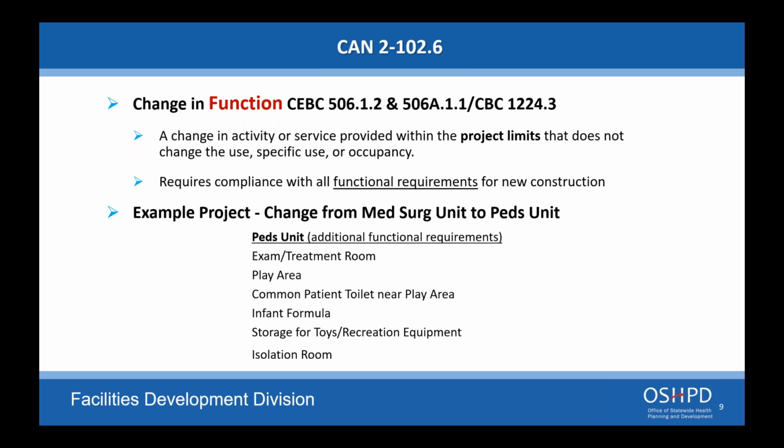Now, if you're doing ICU to an ED and you happen to be reusing a soiled utility room or a med room, that's fine. But for the patient locations, you're going to have to show that you comply with those spaces, because those are not considered patient to patient when you're going from ICU to an ED exam area.